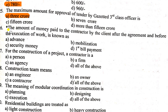Question number 26: The amount of money paid to the contractor by the client after the agreement and before the execution of work is known as mobilization money. Mobilization money is that amount which is paid to the contractor by the owner or client after the agreement is done but before the execution of the work starts.